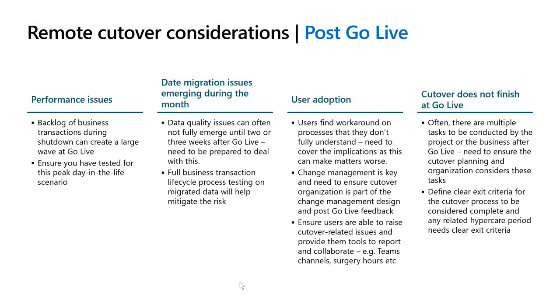Don't forget, cutover very often has post-go live steps also needed. You also need to think about the issues that emerge after go live, right? As a cutover team, you bear some responsibility for making sure you help with resolution of issues that may have been caused by the cutover, either bad data or bad configuration move or something that was caused as part of the cutover, right? You cannot just dissolve the cutover organization and team at the moment the go live happens.